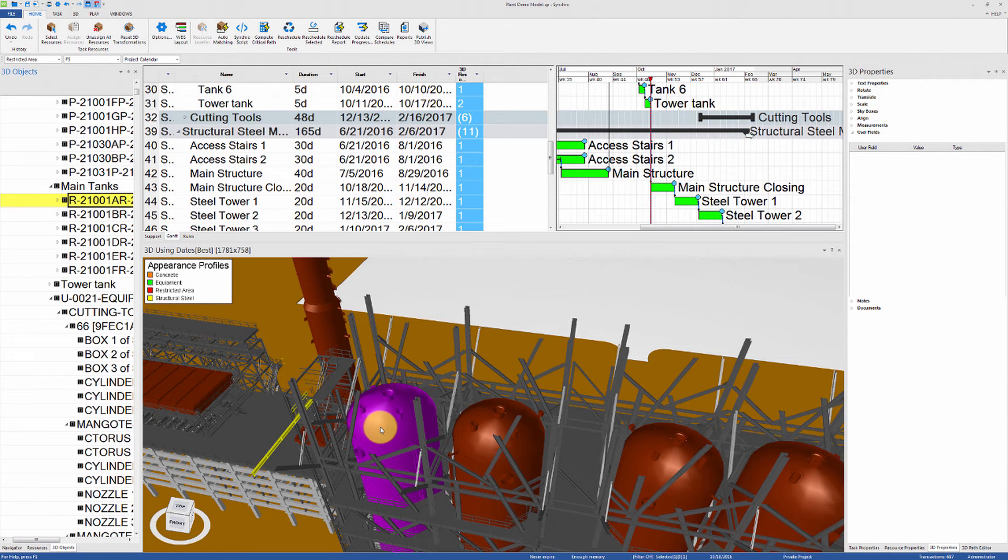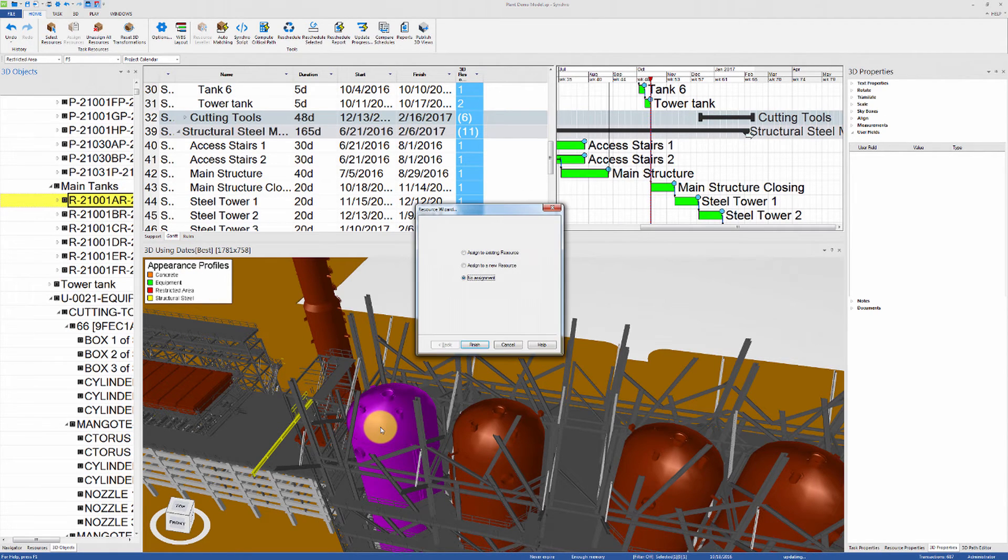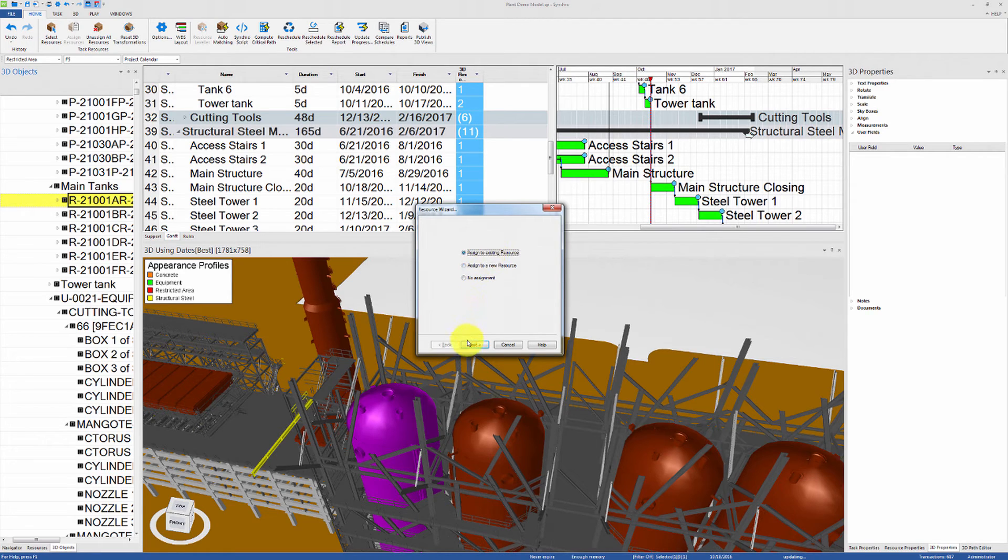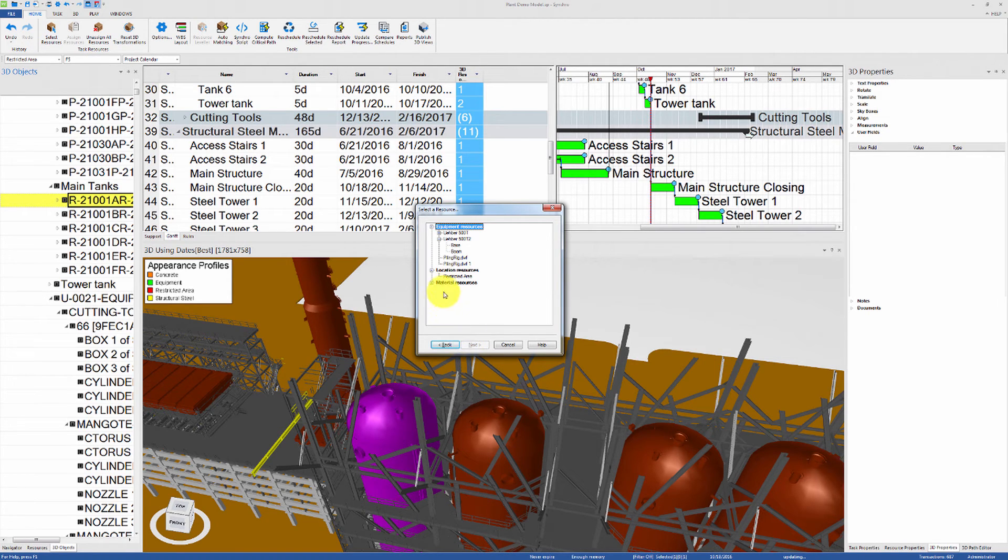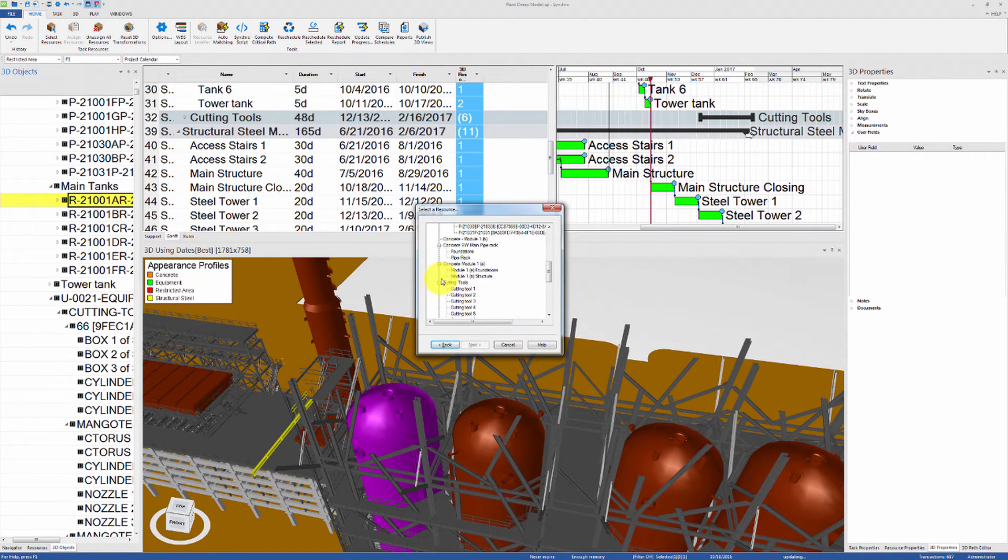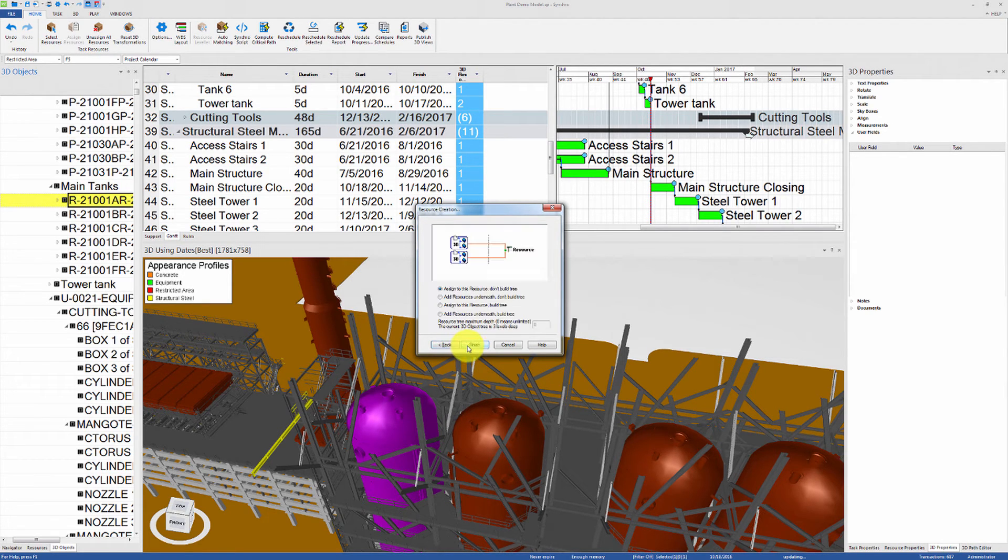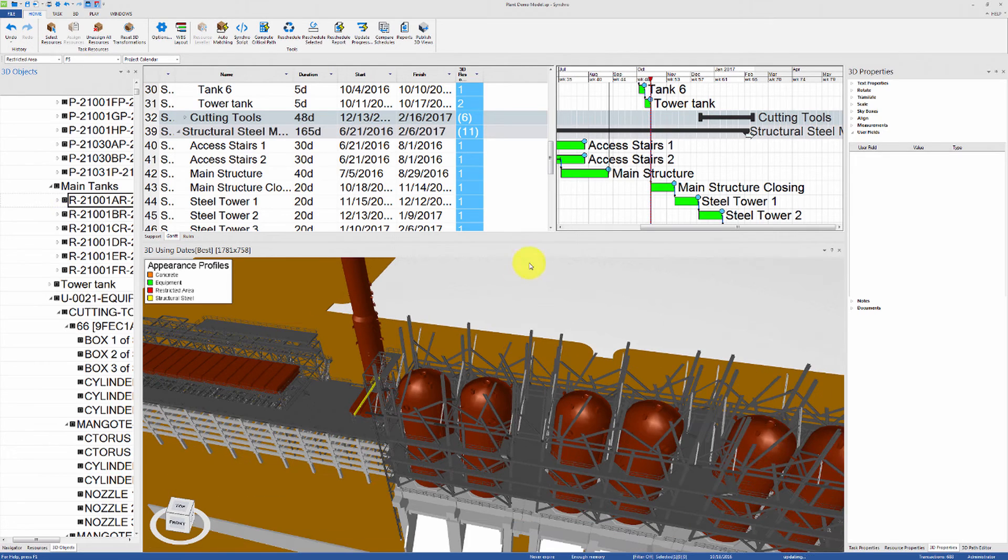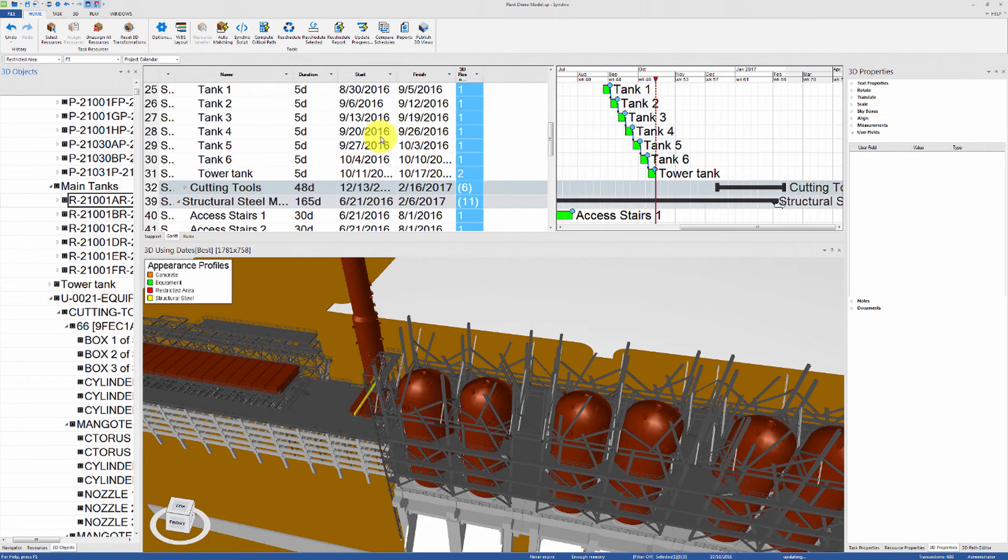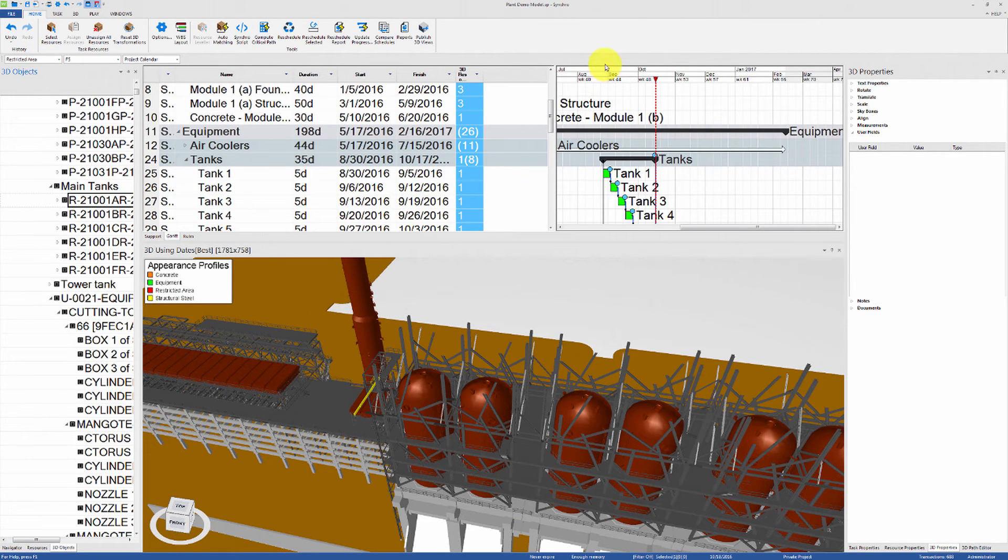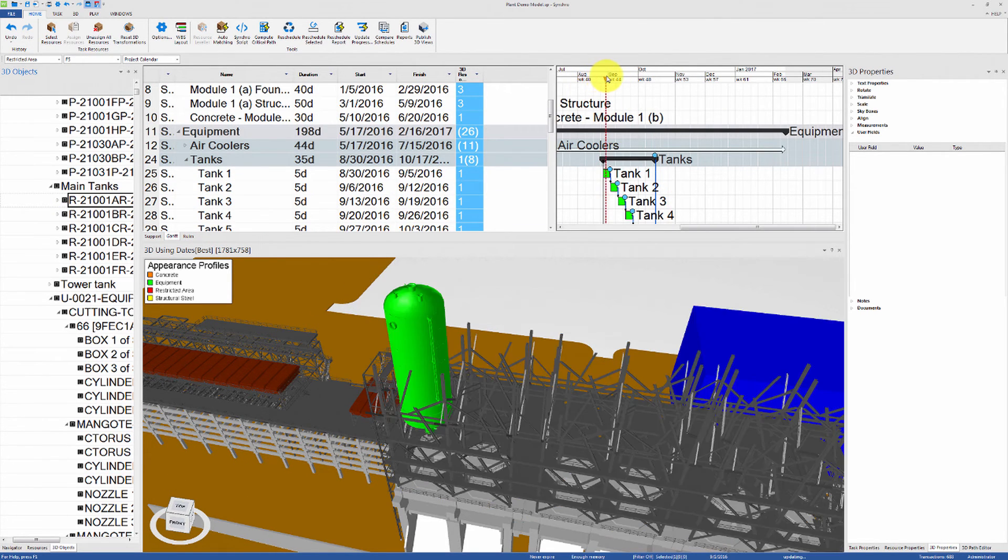But once you do, use the resource wizard to reassign all of these objects to a single resource. Let's reassign to the existing resource Tank1 so that we won't have to relink to the task and 3D path. Move the focus time slowly through the Gantt chart to make sure that the assignments are still correct.